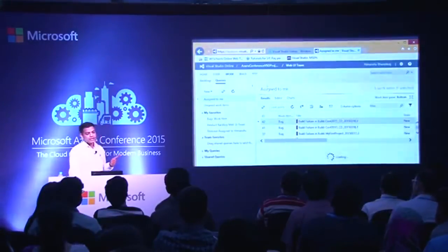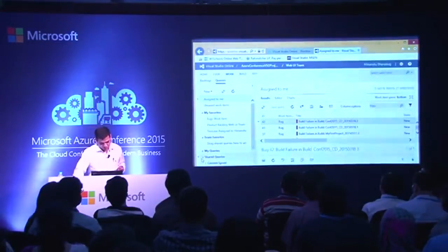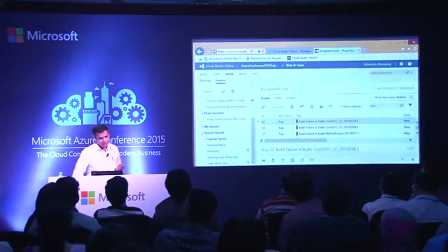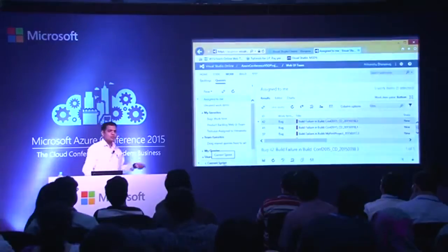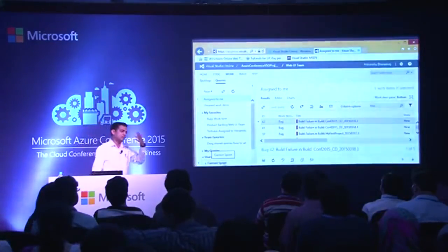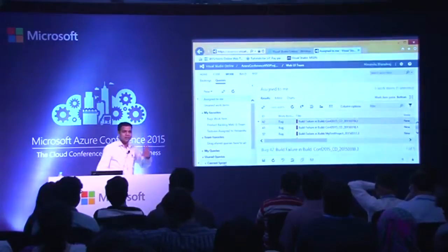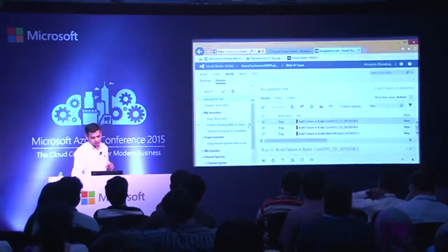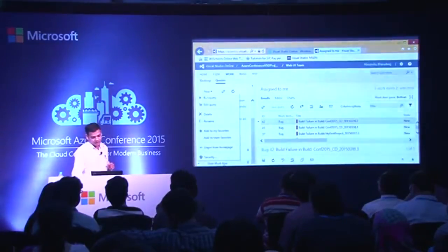Okay, now this is a place where you can create your own queries. That's what I was talking about. Before coming to this session, I created a query for myself, which is nothing but a stale work item, right? In it, I said any task, any work item which was created 2 days ago and has not been addressed till now will come under a stale work item. So I can quickly go here and run this query.